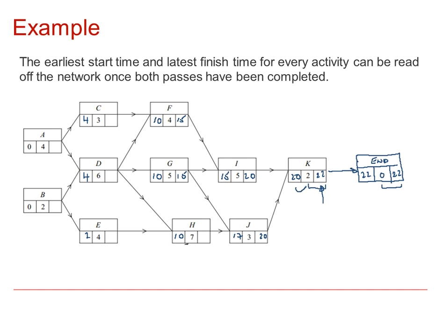Only one going to H, size 17. Now working to C, from F there's only one, so 15 minus 4 is 11. And into D there are 3 that we've got to check. From F, 11, from G, 10, and from H, 10. So the smallest of those, 10. Into E there's only one, so it's 17 minus 7, from H, 10.